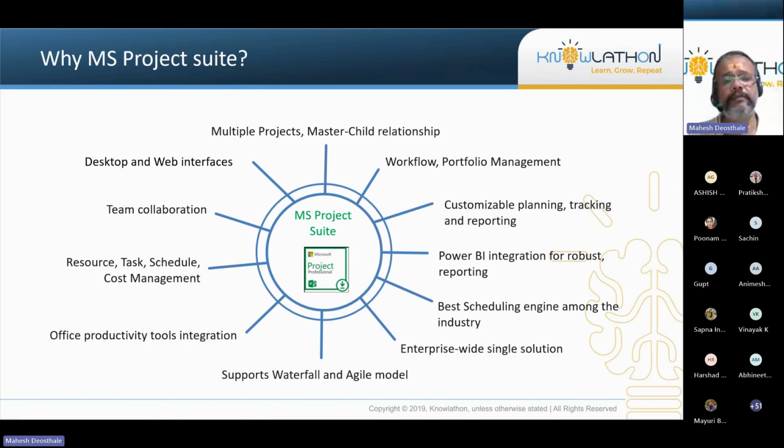Again, at one place, Microsoft Project will allow you to do your resourcing, resource management, your task management, your schedule management, your cost management, your risk management, right? At a nitty-gritty level, there are so many beautiful features, like I can make some tasks inactive. Those tasks will still reflect in my plan, but those will not affect my schedule. Now, this comes handy so many times, especially when I have internal as well as external team members working on the same project.